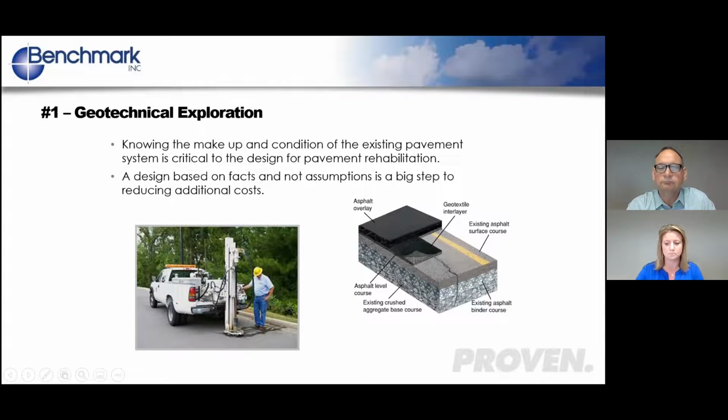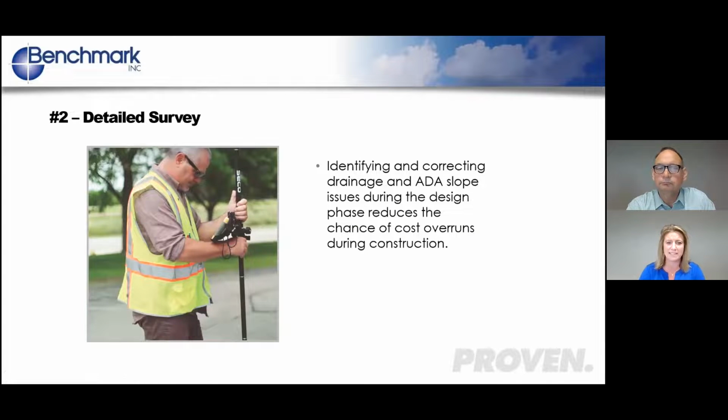So item number 2 is a detailed survey. When we talk about surveying, we would be talking about things like drainage, making sure that you're surveying the drainage and you know what repairs need to be done to correct any drainage at the site, any ADA to make sure that your ADA areas will be within ADA compliance, and then other site or project particulars. Every site is unique, and that's why we suggest site-specific design, because there is no design that fits every site out there.